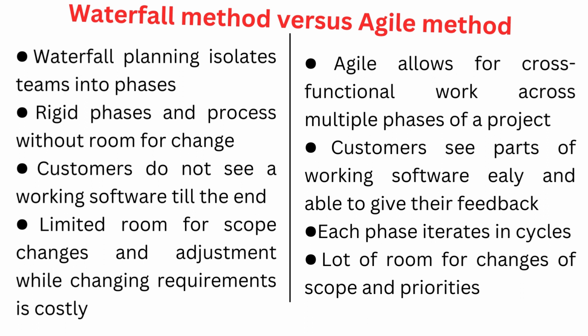This is useful to rectify any issues from client feedback or misunderstanding of the requirements, as well as adjusting the requirements to meet customer needs. So this ultimately results in a perfect system that customers want and are happy about. Finally, the waterfall method has very limited room for scope changes. The scope is decided and somewhat carved in stone once the requirement phase is completed and the SRS is signed off. Therefore, any changes will result in revisiting the whole requirements, redesigning the system, and changing a lot of system parts already coded. So this will be very costly in terms of double effort and time taken.